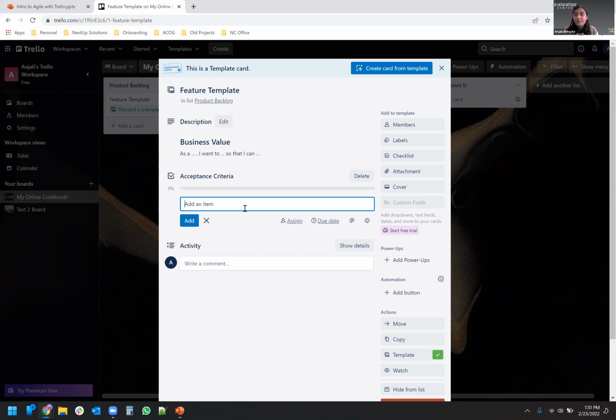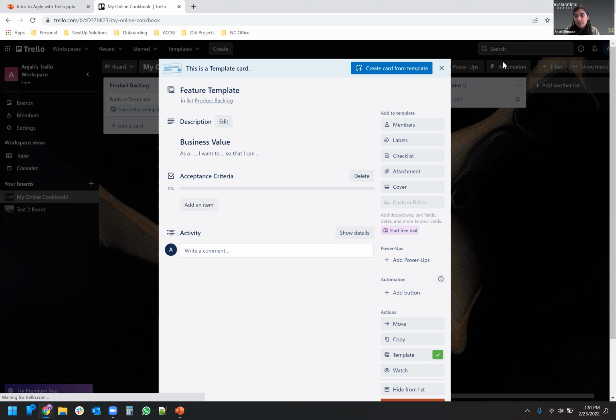And what a lot of that will entail is that the acceptance criteria for the story is met. Testing is done properly. Run your automated tests and make sure it doesn't break anything else in the product. So those are different things that you can make as part of your definition of done, which allows you to move it to that final column here that we've got.